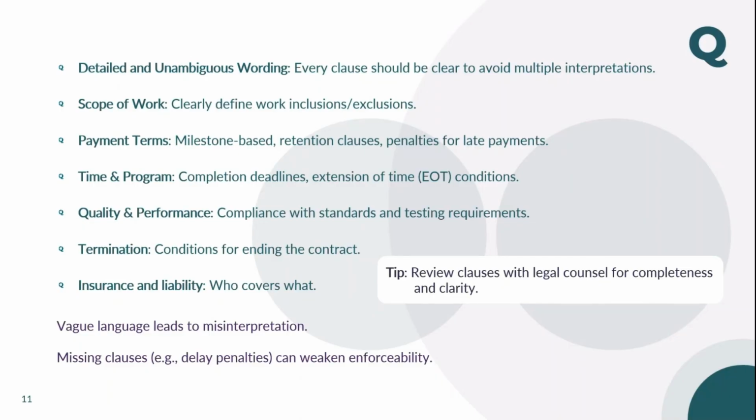So time, cost, payment is there. Now we look into that. If there are changes, which is variations, a provision should be there. If you have these clauses, you are safe in terms of your project, as called time, quality, cost, impacts are covered. So eventually, quality part, you can control through a specification or a methodology under a contractor's obligation.